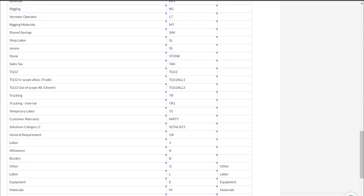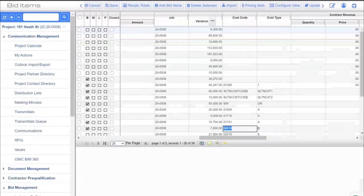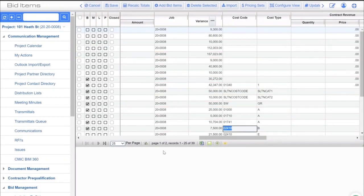As you go through and work your job, it doesn't matter what stage your job is in — whether it's a brand new job, just starting execution, or closing out. As you update the cost structure within CMIC, those elements of the cost structure become available within the Procore system.